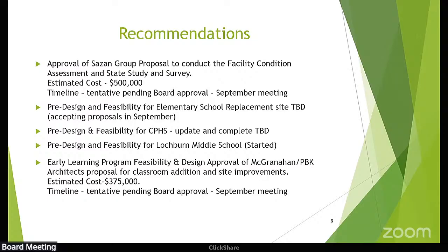What we know so far, and we've seen a lot of this with some of the older schools already, is that your plumbing infrastructure, both sewer and domestic water coming in, is at end of life. They say that pipe is typically a 50-year life cycle. We have several schools that are over 50. We've seen Idlewild, for example, where we already had to go in and tear some of that pipe out because it started leaking underground. These are the things that we're starting to see.